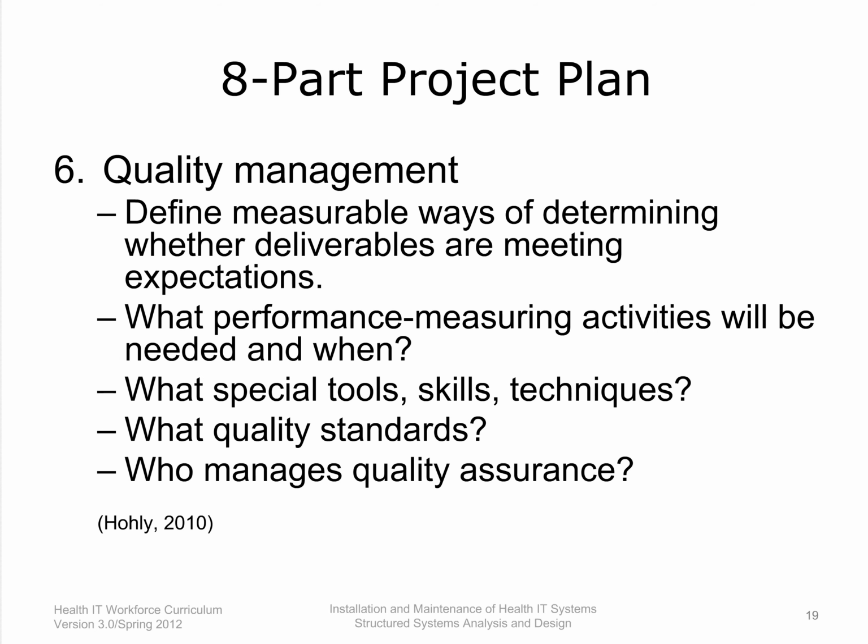Slide 19. Quality management is the process of ensuring that the project's objectives adequately meet expectations. Your project plan should identify and list the methods you plan to use to ensure your deliverables are up to snuff and how that methodology aligns appropriately with any industry standards or regulations which must be followed. This would include any project reviews or inspections you plan to conduct, along with any testing or test scripts, and where in the process each should occur to ensure quality guidelines are met.